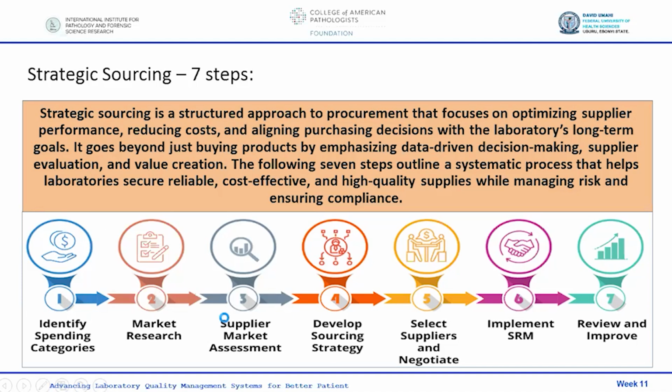Then you go ahead and do a supplier market assessment. You assess your suppliers. We've mentioned this before. Then you develop a sourcing strategy. Then you go ahead and select your suppliers and negotiate. After negotiating with your suppliers, you can now go ahead and develop a relationship, what we call supplier relationship management. It's very important. Then you review and improve as time goes on.